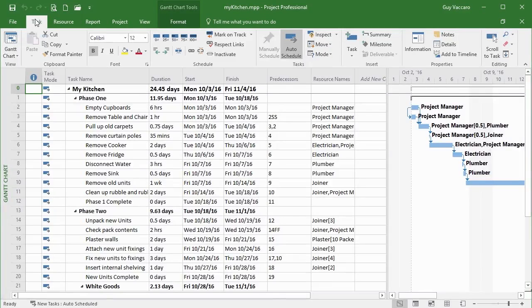Everything we've done so far has all been about building the project plan, deciding on the tasks themselves, deciding on their duration, their dependencies on other tasks, their resources, and then controlling any of the calendars that we might need to control. Microsoft Project's usefulness doesn't just end at helping lay out a pretty plan, it's great at being able to allow you to track your project. So we can put in task progression, it's finished, it's halfway done, it's three quarters done. We can delay tasks, we can resolve problems as we're working through the project.